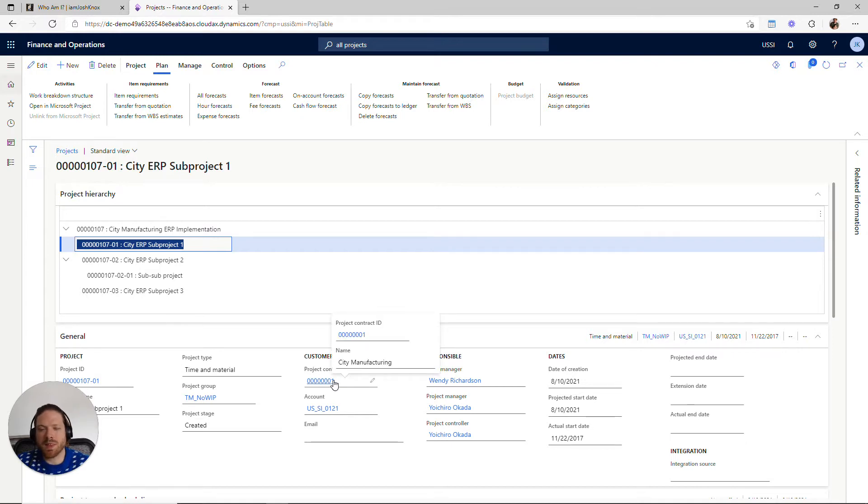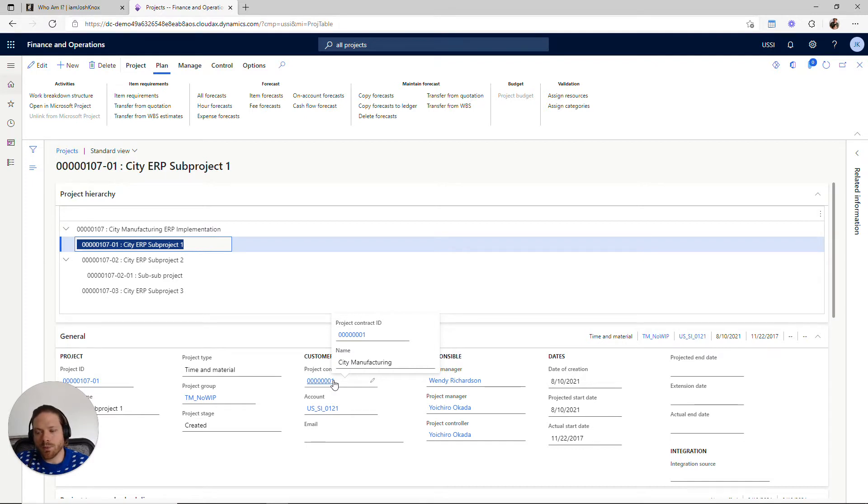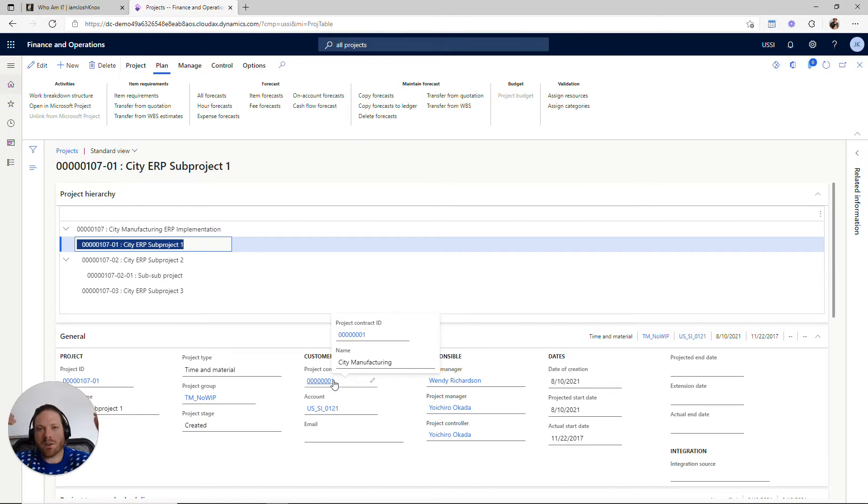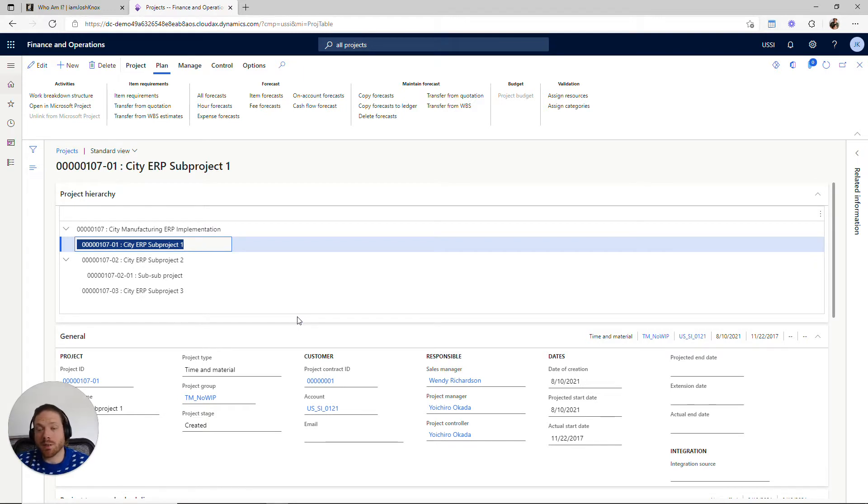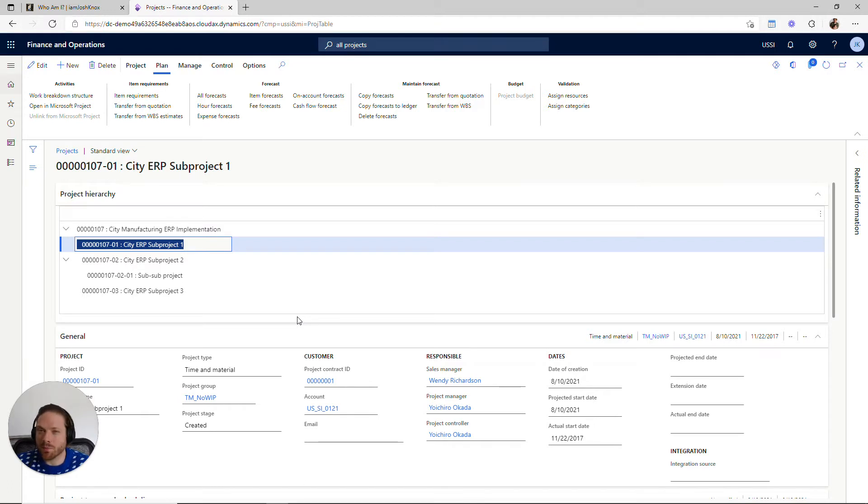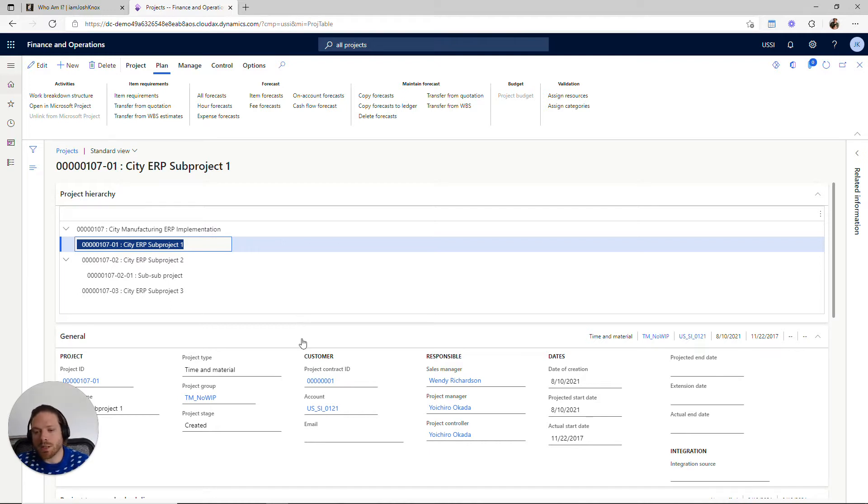So if we think about what's happening in Finance and Operations, the way that these structures work is we have a project contract as your header—that's the highest level that you can have—and every customer-facing project is going to be associated to some project contract.